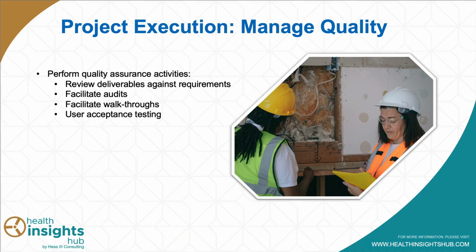And as you can see on the slide, we're going to be doing all of our quality assurance activities. So doing those audits, doing those facility walkthroughs. And this last component is about user acceptance testing. User acceptance testing is when you engage the end user of whatever process or product that you're developing and get their feedback on it and make sure that they're comfortable with it.